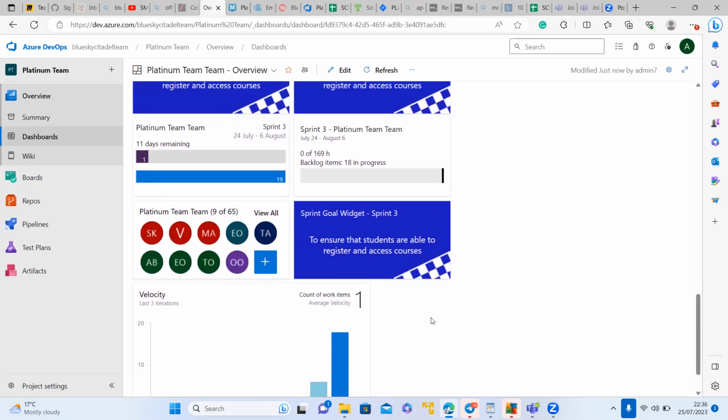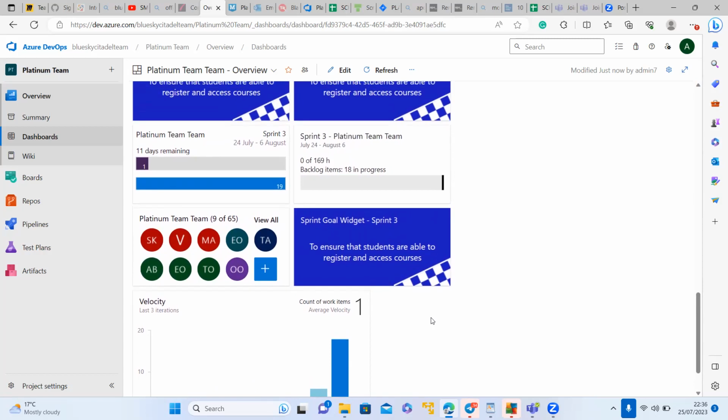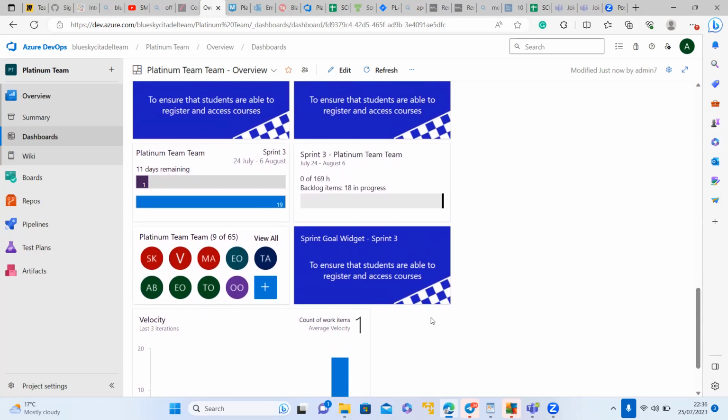So you can negotiate also with your PO. Like I said, the PO is the only person that has the authority to remove stories from the sprint. So you can negotiate with them to say, with 12, you don't think the team will be able to complete. Some don't mind spilling into the next sprint, but it's just a bad practice. It's not one of Agile's best practices, but that's not the main reason. The main reason is for us to work incrementally, do a small bit of work, focus on the goal, finish it, go to the next bit to pick and work on.